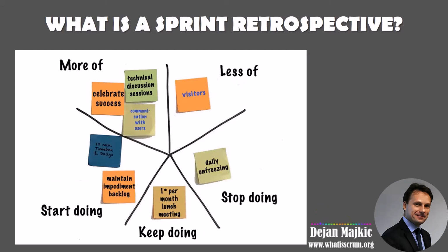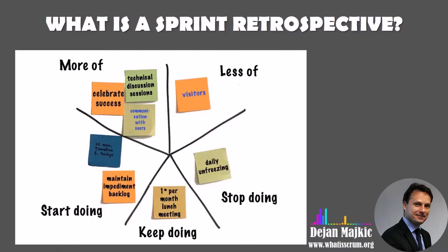The team selects what is important and what should be focused on. This gives the team a sense of contribution to improvement and allows them to own it. It helps the team to be internally motivated to succeed, and they don't need outside forces pushing them to improve. Okay, now please remember that Sprint Retrospectives are time-boxed to 3 hours or less for a 1 month sprint.